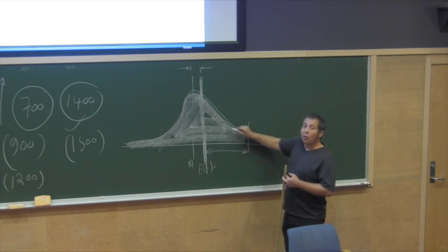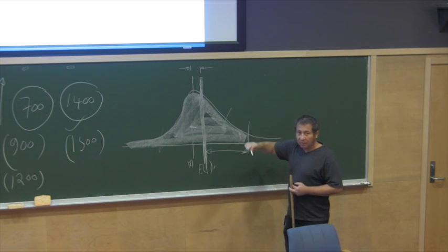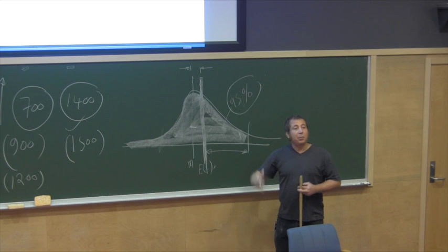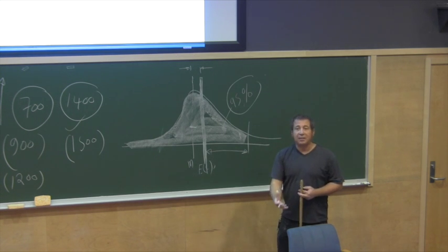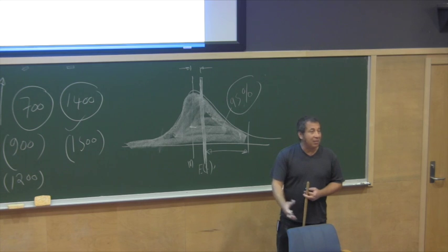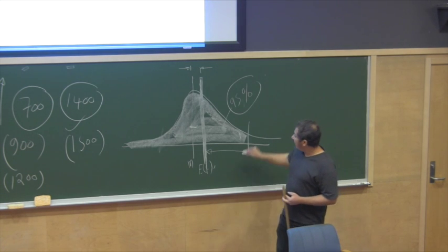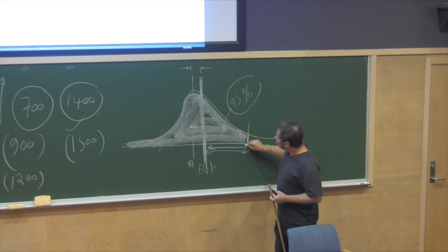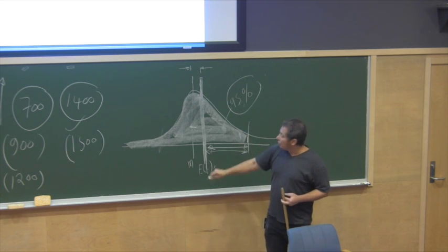And if your goal, let's say, is to be 95% confident, which means you want the probability that your cost estimate will suffice for your project to be 95%, then you must find out how many standard deviations you need to add to your cost estimate.